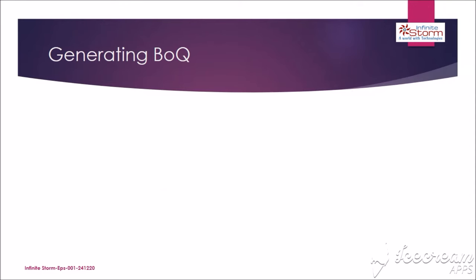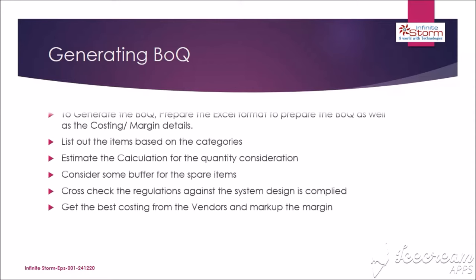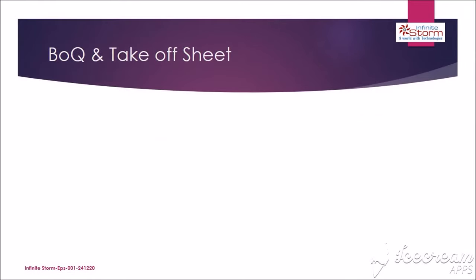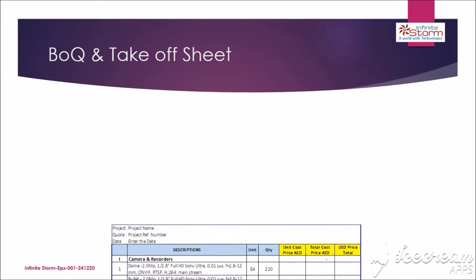To generate the BOQ, prepare an Excel format for the bill of quantities as well as costing and margin details. List out the items based on categories, estimate the calculation for quantity consideration, and consider some buffer for spare items. Cross-check the regulations to confirm the system design is compliant, then get the best costing from vendors and mark up the margin.